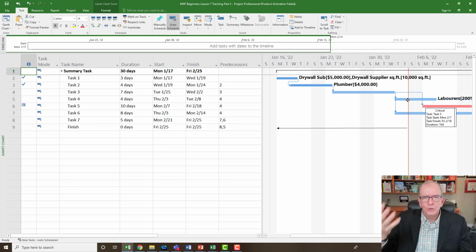I'm not updating the schedule into the future. I'm already at Friday night, and I know that this task is starting on Monday morning. I've moved it to start there. I haven't said that it has done any work yet, but I've moved it to start there.